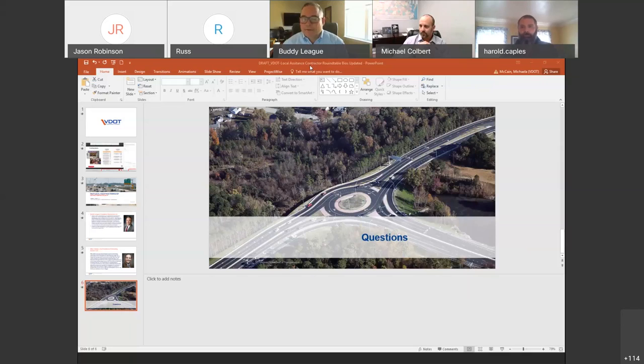Buddy? I agree with that too, Harold, with what Mike said, but we can also help you all as well. I know, Harold, you've gotten a couple calls that say, hey, you've got this job out here and it's a $10 million job, but there's no way you're going to get it done for $10 million. In extreme cases where we have that kind of dialogue, it can help the locality or VDOT reassess what their budget is, where did they go wrong, and maybe save some time on the front end, by delaying it or changing the budget, so that you don't have to get a bunch of bids that are over budget, throw them out, and go back through the same process.